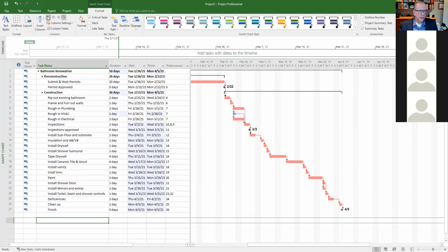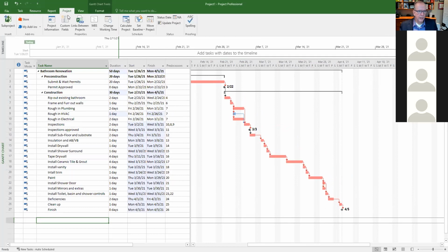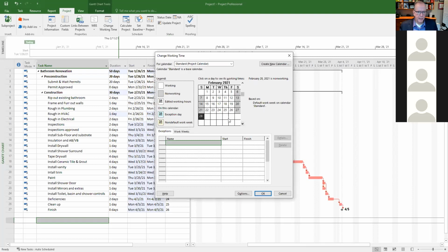Okay, and then last week, of course, we showed you how to put in a holiday. You go to project, change working time. You put in a holiday under exceptions, like maybe Family Day, as an example. So I'm not going to get into that too much, just a quick reminder of that. And you click OK. All right.